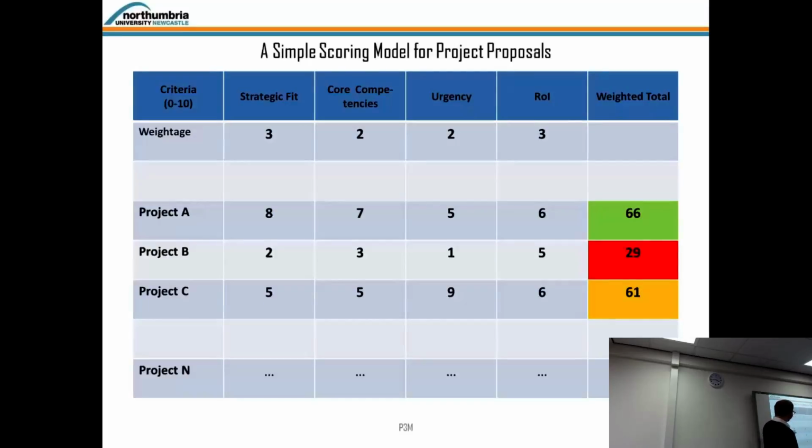So for example, project A. In our university we have a strategic goal, internationalization. It was a question, should Robert fly out to all our joint ventures and make sure that the operations work well with the companies that they use? And then the strategic fit is very big because we want internationalization, so it was okay to send me 3 times a year out. So things like that could be assessed that way. So this is project A, internationalization.